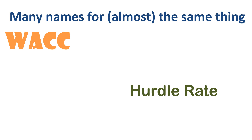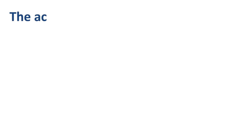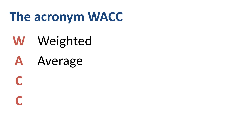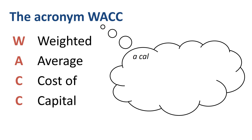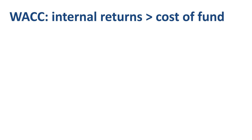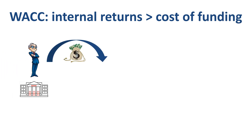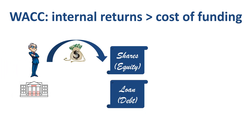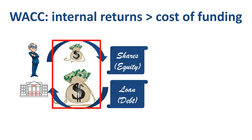It's best to start with WACC, as the hurdle rate is merely a variation of WACC. The WACC is the weighted average cost of capital — a calculation of a firm's cost of capital in which each category of capital is proportionally weighted. Investors buy shares and banks supply loans to make a return; the required rate of return for all types of capital combined is the WACC.